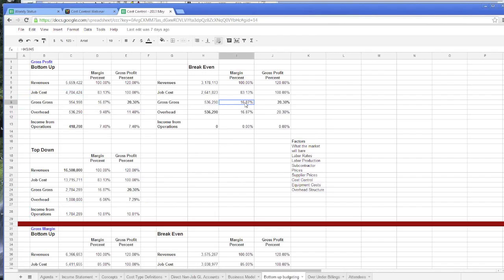You've got your profit and overhead, right? So you've got your job cost, you've cut it in. Here's your gross profit concept. So let's say you think you'll win $3 million, and the guys are saying profit and overhead 20%. Well, what do you expect? If you're doing $3 million, you're going to probably bring in about $500,000 in profit and overhead. Okay, what's your overhead? If it's $500,000, then you're bidding to make no money. That would be a break-even analysis.